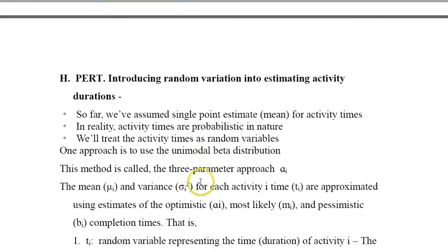The problem with the distribution here is that we cannot have data because each project is different. Once we decide on the activities, usually the way we find the distribution is we look at historical data, do a histogram, and find the shape of the histogram, and that tells us what our distribution is. Well, in this case, there's no data. So how do we pick a distribution?